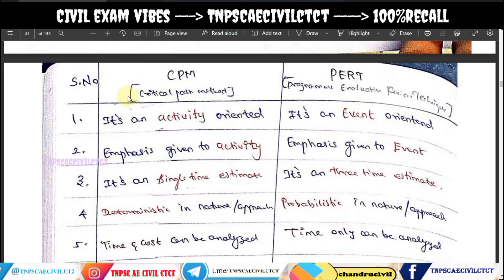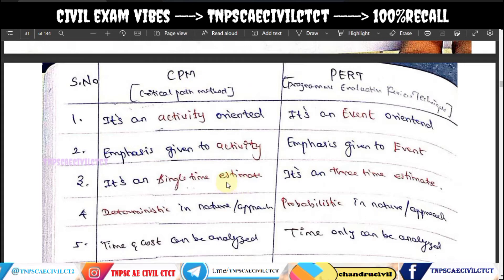CPM is fully activity-based. PERT is event-oriented. CPM uses a single time estimate, while PERT uses a three-time estimate. The activity has a start, an end, and an in-between stage.